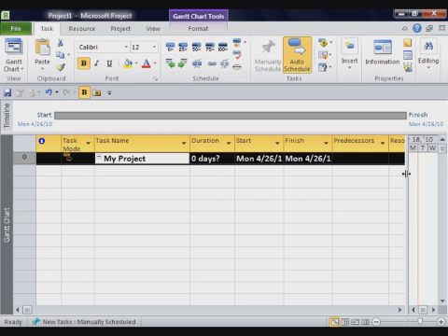And you can't just insert it and turn it on as a project summary task without first going into Properties, then going into Options on the Advanced tab and checking that box to turn on the project summary task. You can't just insert it on the task menu.